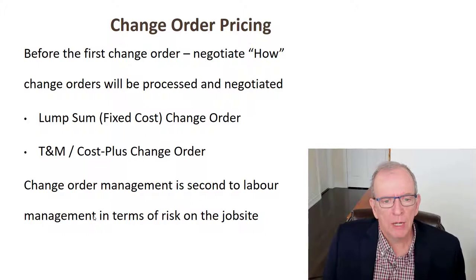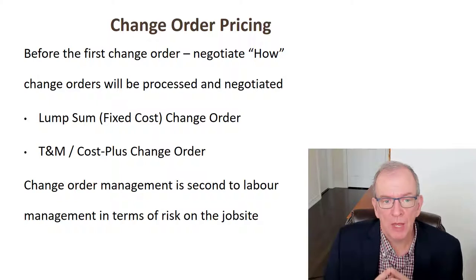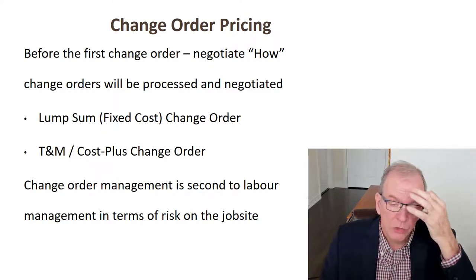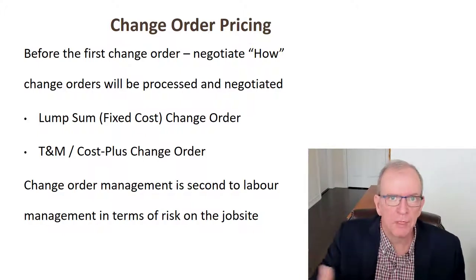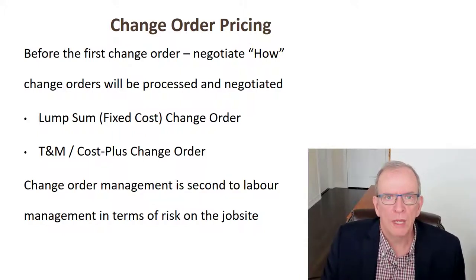So we really also have to think about change orders and our pricing. We can think about change order management, the process of pricing it. Sometimes we're in a big hurry for the price. So is it going to be a lump sum change order price? Is it going to be time and material or cost plus for the change order pricing? A lot of that has to do with how urgent it is, meaning that, well, we've come across this, we've got to fix this right now. We're working on a price, but in the meantime, we're going to charge time and material or cost plus till we get the full price in for this. Those kinds of aspects, how it is going to be priced, are important.